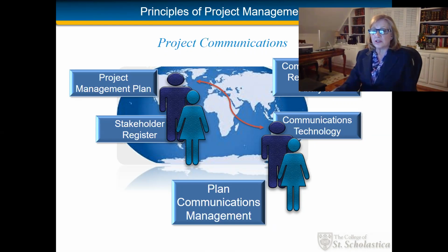You also want to include in your project communications management plan any communications constraints that might exist, such as your policy for confidential or restricted information, protocol for handling this type of information, and policies for communicating outside of your project team, stakeholders, or your sponsor. Your communications management plan might even go so far as to include sample forms or templates, as well as the instructions for using them, such as the status reporting, change control, or issues management.